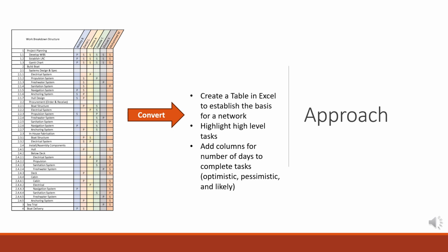For our approach, the first thing we did was create a table in Excel to establish the basis for a network. We then took that work breakdown structure and highlighted each high-level task. We then added columns for a number of days to complete each task. Within these tasks, we had a column for optimistic days to complete a task, pessimistic days, and likely days.